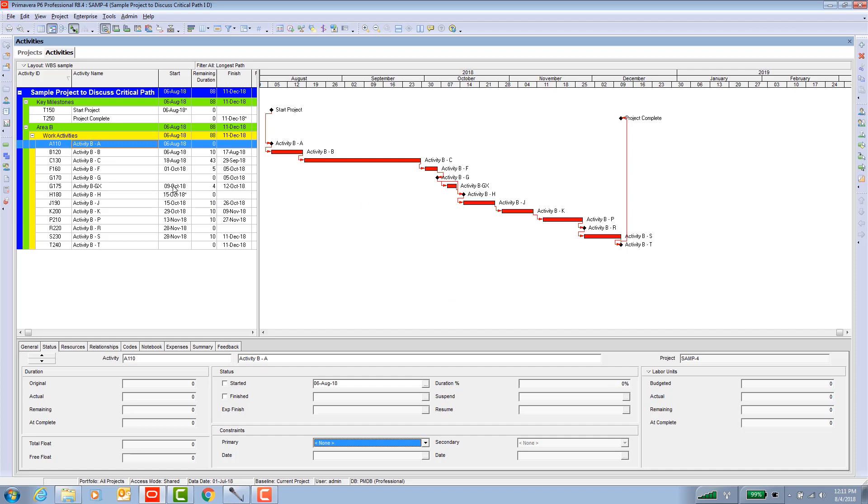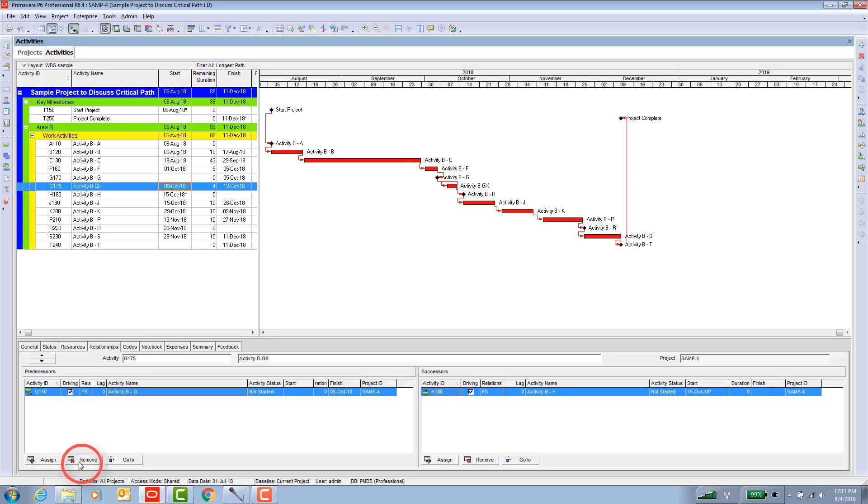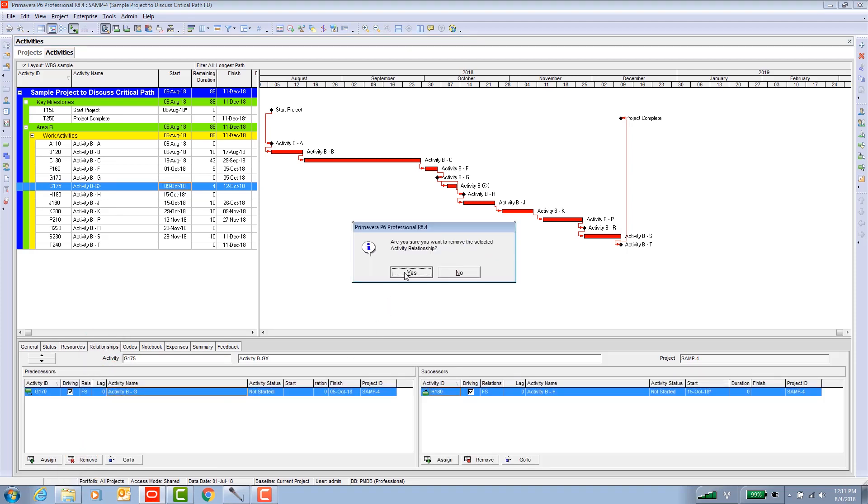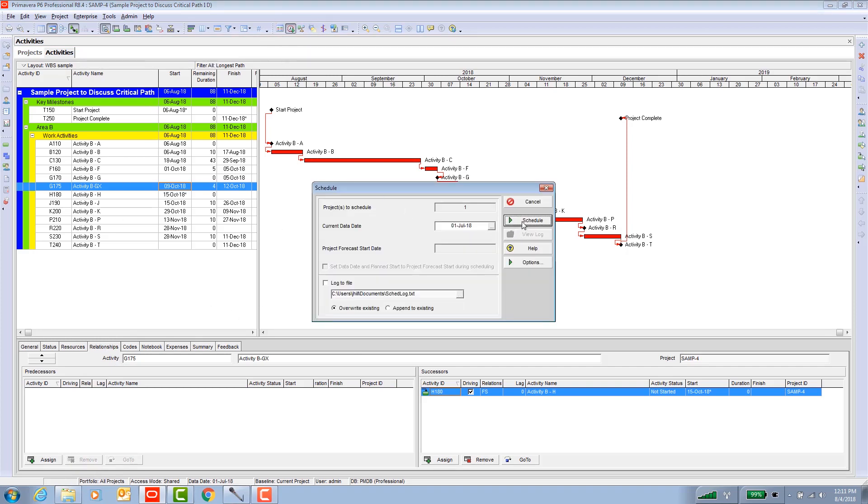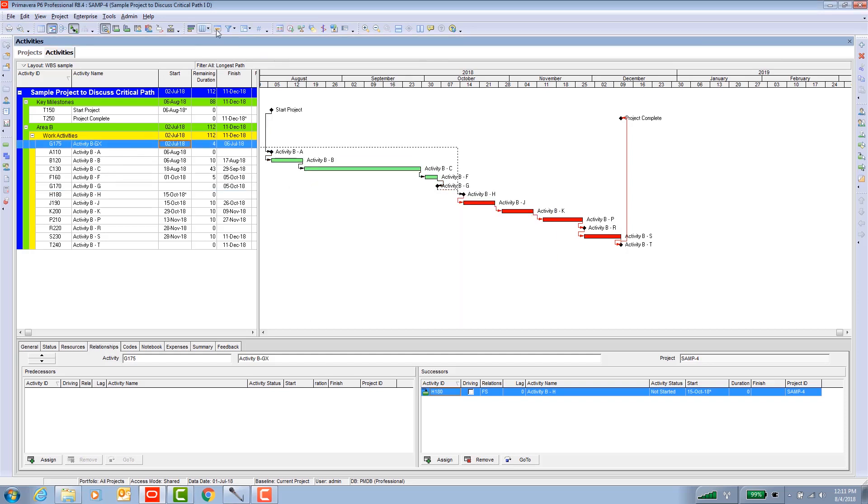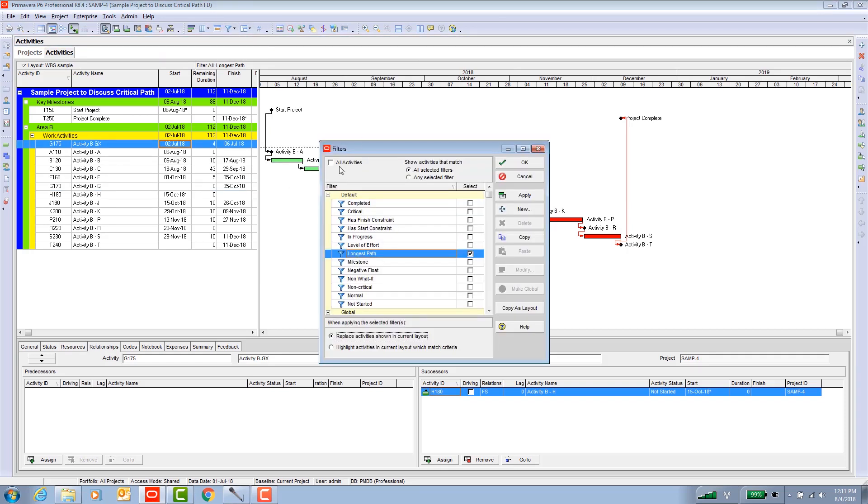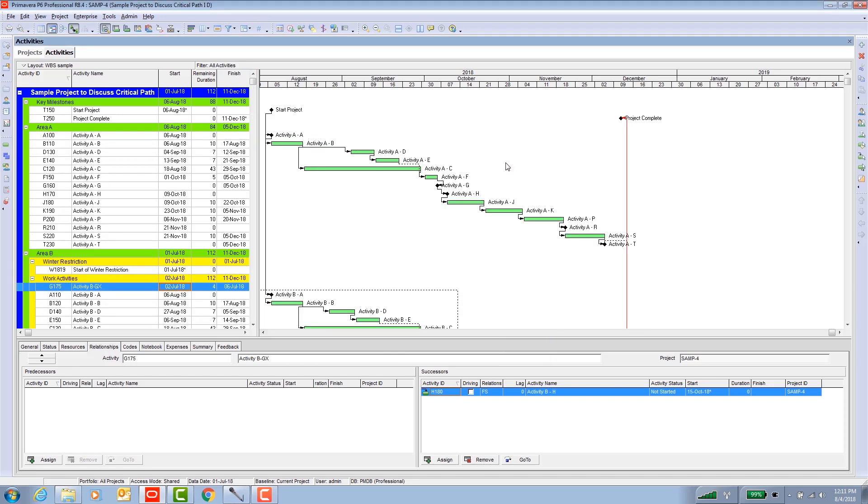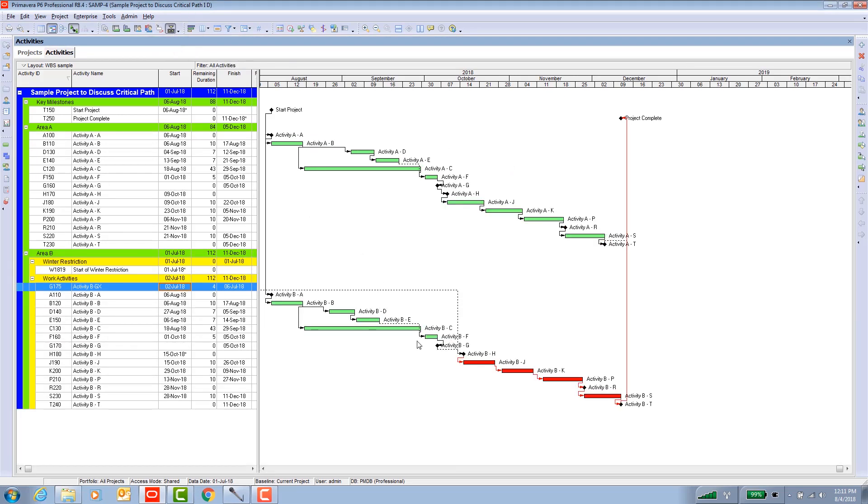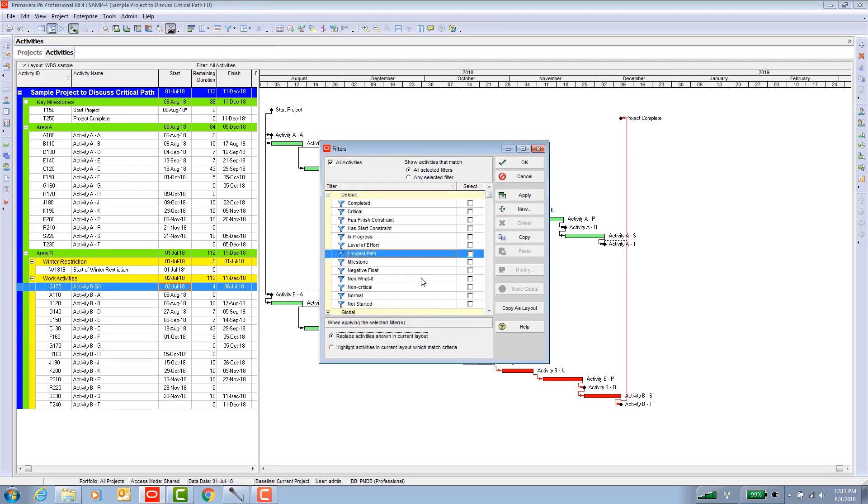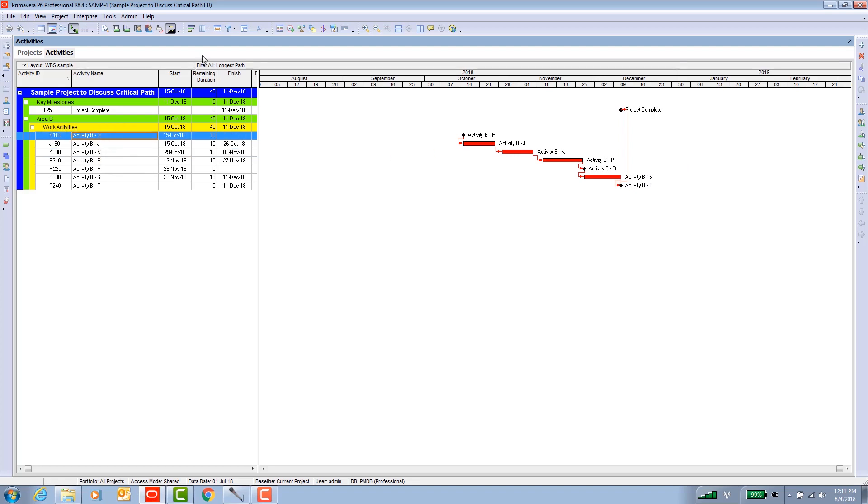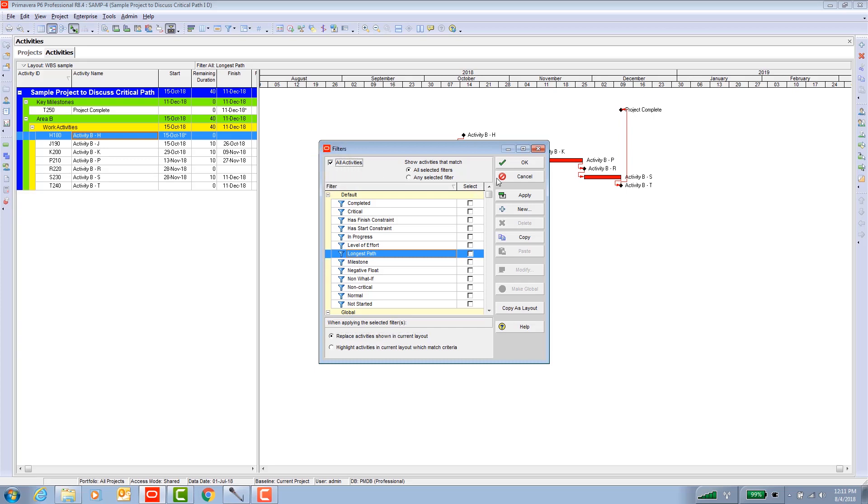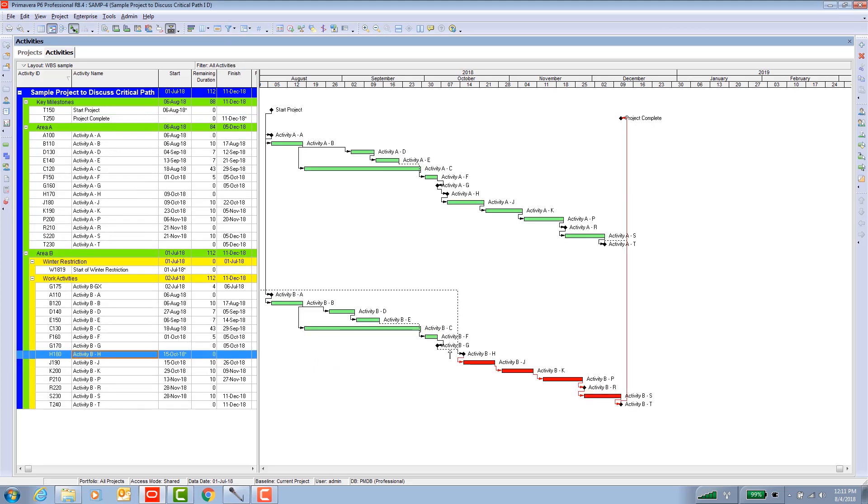Let me make it non-continuous by taking out this activity from the logic. I'll just remove the predecessor and I will schedule again. We'll bring back all the activities, and then we'll run the filter. Longest path turned on. As you can see it went to the final activity, worked its way back to activity BH and BH had a gap behind it. In other words the predecessor was not driving it. In this case a constraint was, let's bring everything back to take a look. There's a gap caused by a primary constraint you can see by the star. And so that's caveat number two.